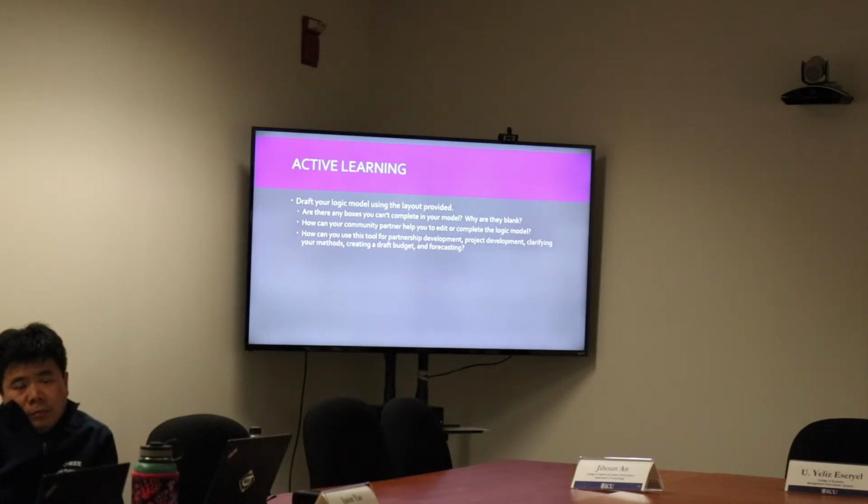And then once all the elections happened, partnerships kind of redeveloped because people were still in their current job or not in their current job, that kind of thing. So those would be external factors. It impacted how quickly their study moved. It had an impact on whether or not they could collect data. So they had one plan that was to have 4 sessions over the semester, and by the end of the semester they had 1. And those are just factors that were beyond their control. So if you can think of anything external that may have an effect or an impact on your activities, etc.